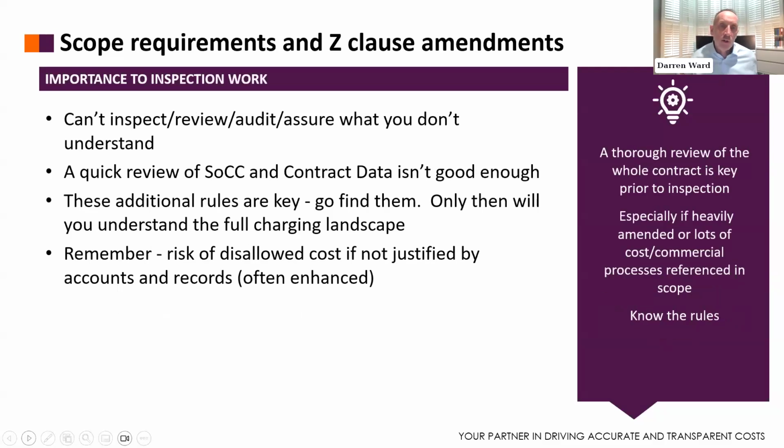So why are those scope changes and Z clauses amended? Why are they so important? Well, you can't inspect, review, audit, assure, whatever words you want to use. You can't do that unless you understand the charging environment. And so often a quick review of the schedule of cost components and the contract data just simply isn't enough. So if those additional rules are there, you've got to go and find them. And only then do you understand what the full charging landscape is.